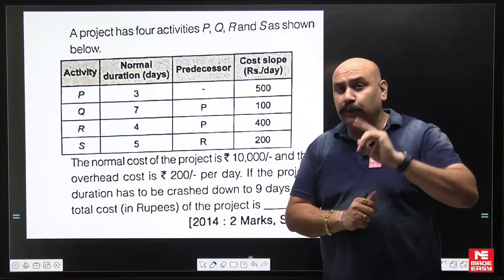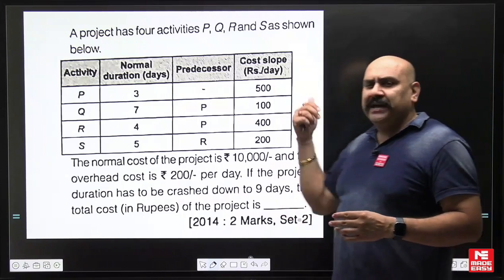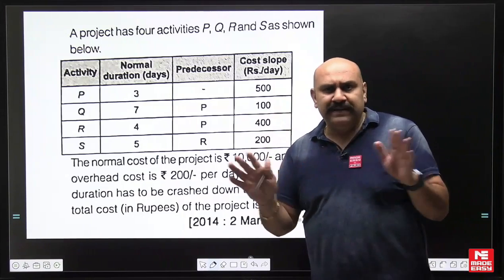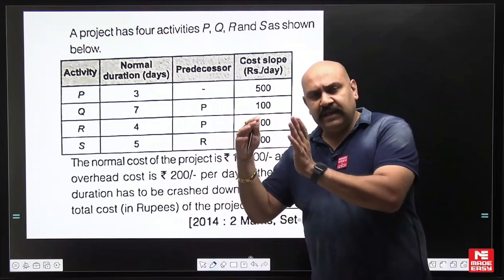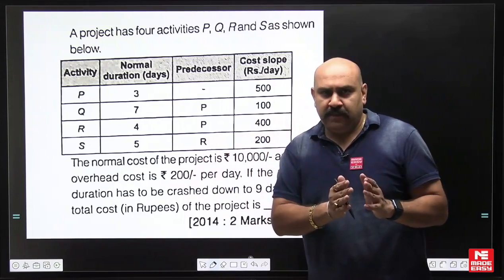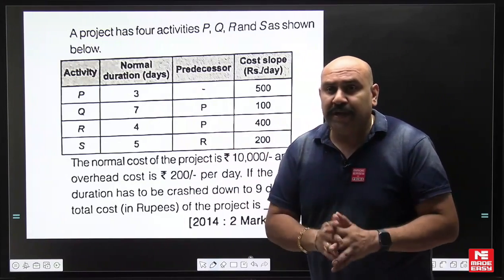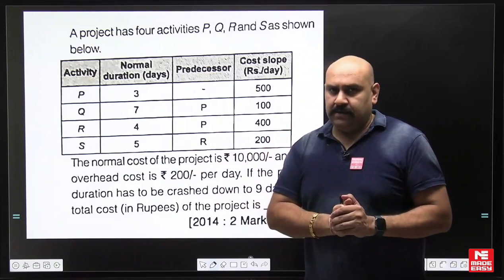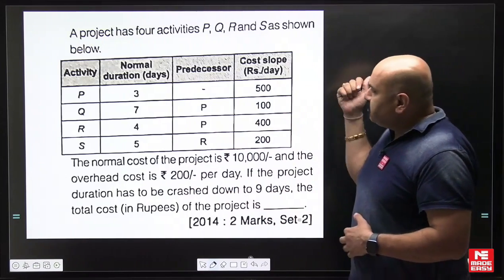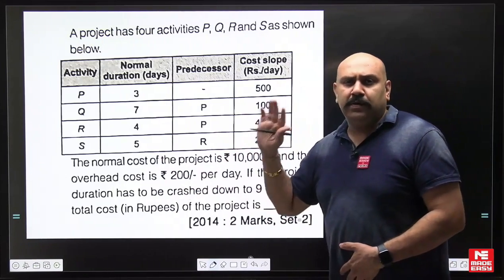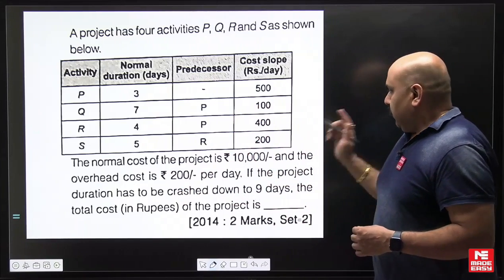No crash limit is given in this question, meaning you can crash to any point. Normally in crashing problems they give normal time and crash time — crash time being the minimum time up to which you can crash — but in this question they have not given anything, meaning you can crash it up to any point.